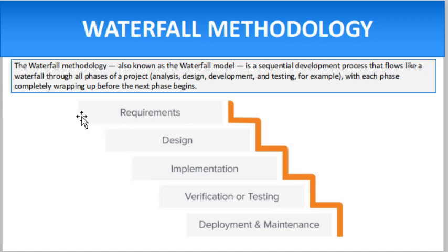So, the first phase is the requirement phase. The waterfall methodology depends on the belief that all project requirements can be gathered and understood upfront. The project manager does their best to get a detailed understanding of the project sponsor's requirements. Written requirements, usually contained in a single document, are used to describe each stage of the project, including the cost, assumptions, risks, dependencies, success metrics, and timelines for completion.